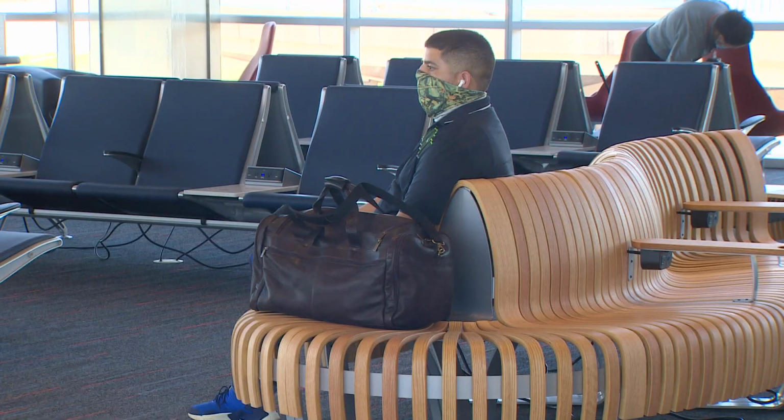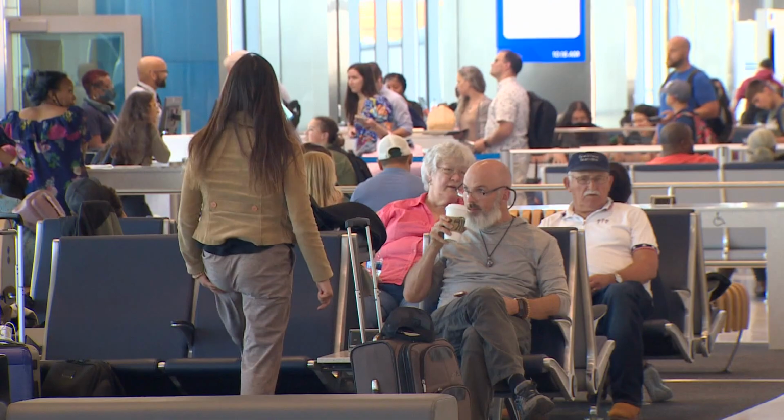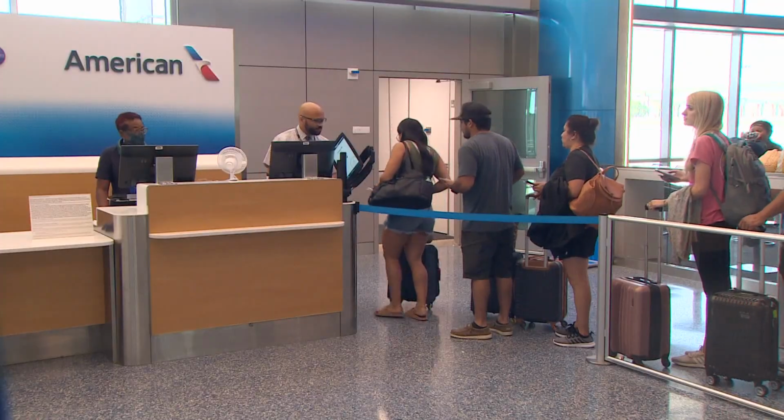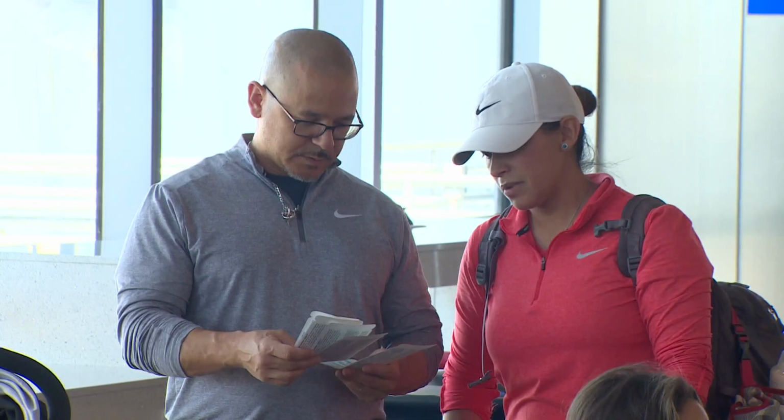And that's not all. The biggest role, I would say, is providing additional capacity to relieve some of the congestion that you may see happening. These new gates were constructed off-site and then transported overnight to be put into place where interior work was done. Really the first airport to do that kind of work. They opened June 1st, 4 months ahead of schedule, and just in time.